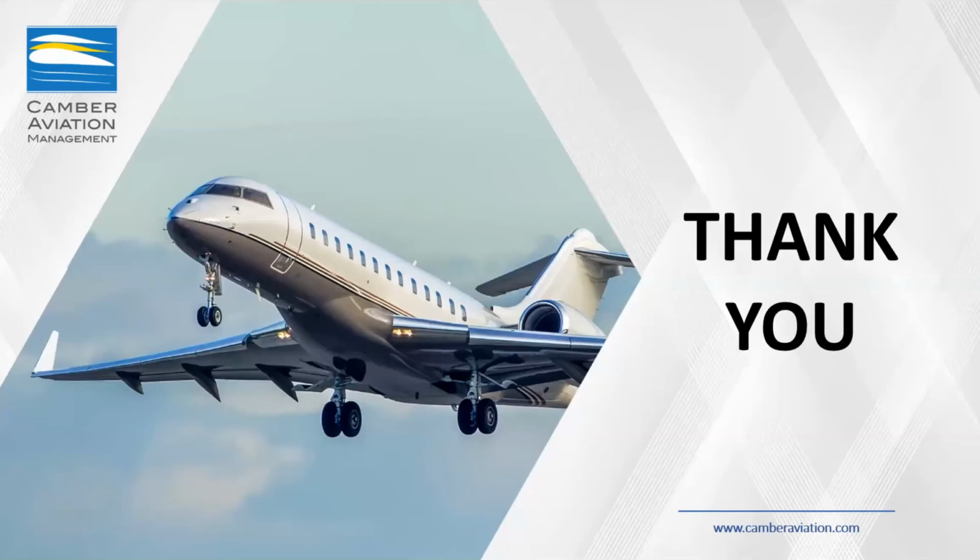Sure. So if you're buying a brand new Airbus, let's say A319 Neo or a Boeing business jet, MAX 7 or a MAX 8, you're looking for the green aircraft of very roughly, depending on what you're looking at, somewhere between 60 and $70 million. And it's fair to say, depending on the interior and depending on the features that you want to put, you can budget anywhere from about $25 to $40 million to complete that aircraft. Now, the follow-on question is clearly, well, what's it going to cost if we did the same aircraft pre-owned?